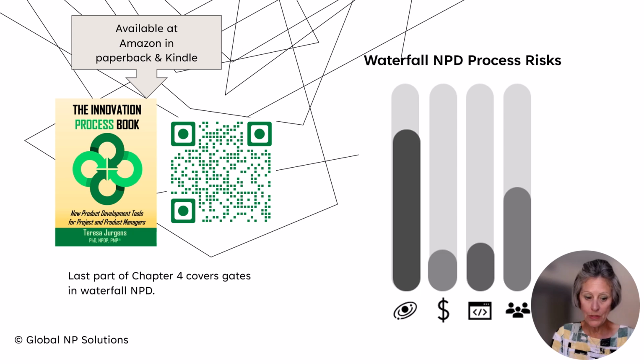Gate 1, business case. In another reading, we covered figure 2.5, illustrating a staged and gated process for new product development. Following the phase of work in which the organization scopes market and technical opportunities, gatekeepers evaluate the viability of the new product at Gate 1. The primary purpose of this decision is to judge whether the project has enough financial merit to move forward. Gatekeepers are tasked to balance the rough business case numbers against new product risks: customer, financial, technical, and people, according to the corporate and innovation strategies.